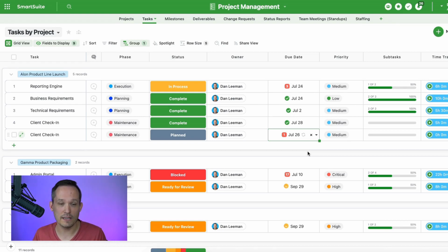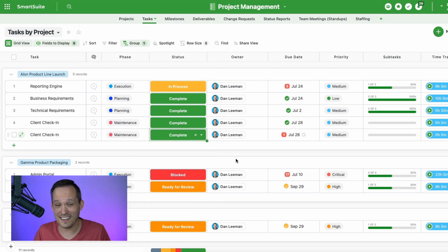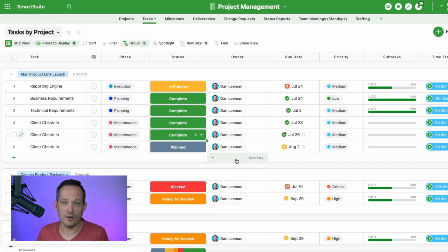Well, in this case, because we want it to still be on Wednesdays, even though we're late at completing this, now that I am marking this off to say we're done, I was late, it's on a Thursday, but because that recurrence is still on a Wednesday, it's going to know that and still create the task for the next Wednesday. For those of you doing a lot of project management, I know that repeating tasks are going to make your lives easier.